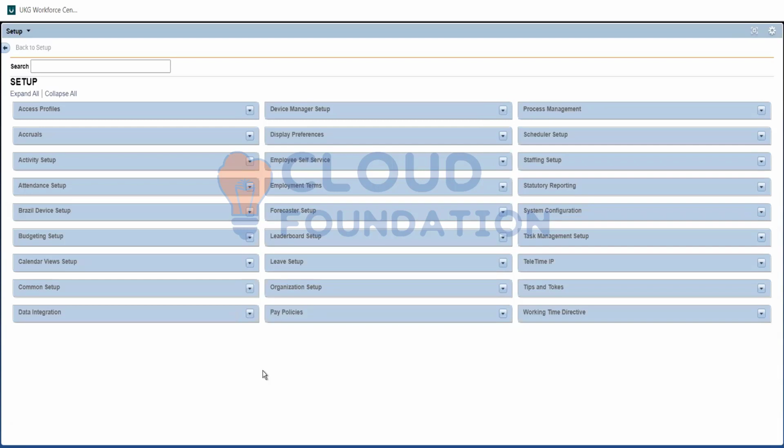Whether you work or not, you are going to get paid. That's how most of the Kronos agreements are. Per hour, this much is the dollar. They will quote and sign the agreement. The client is supposed to give me work, and what we define is that this much amount of work will be done from our team. If they don't give that much work, it is not going to bother us. The client needs to pay for that amount of work. That's it.